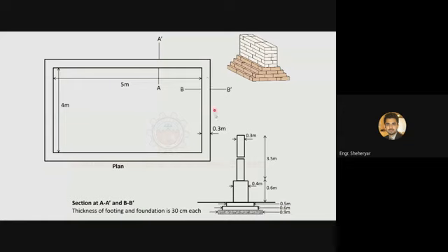You can take the wall with the shorter length as long wall and the wall with longer length as a short wall. So please don't confuse yourself that the one with more length will be the long wall and the one with less length will be the short wall. Both cases are possible, it is your choice.